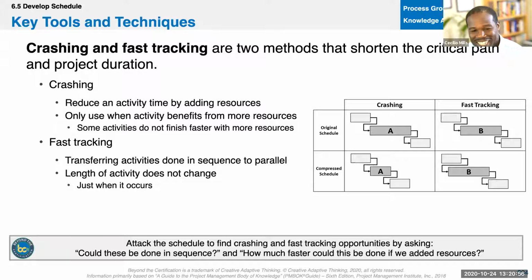All right, and by the way, as a schedule compression technique, if you had a single phase project, fast tracking wouldn't actually work, because even if you do activities in parallel and out of order, there's still a critical path. And those usually have finish to start relationships, mandatory dependencies. So there's nothing you can do there.